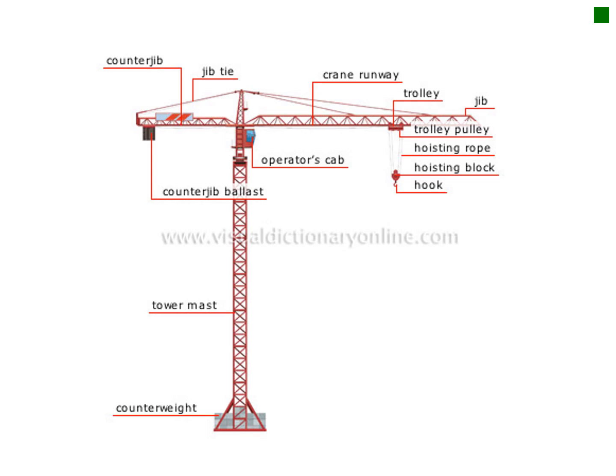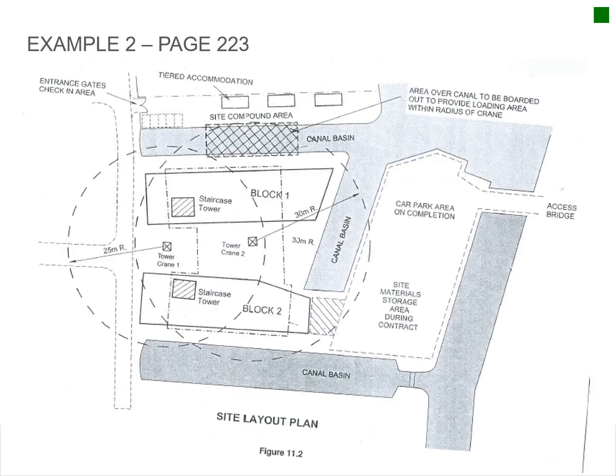Just to put the drawing on for you. So example 2, proposal 1: you've got a proposal of having one fixed crane on this side and another fixed crane on that side. The one with a 25 meter radius and the other one with a 30 meter radius, and they actually overlap with each other. So you've got fixed cranes, so you will use this first crane, say up to a point. You will see it's not in the basement. The basement is that dotted line going around there.